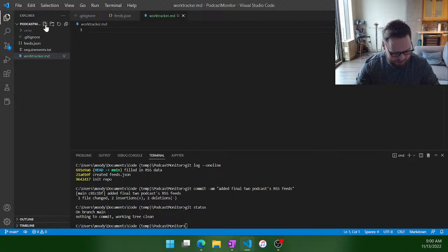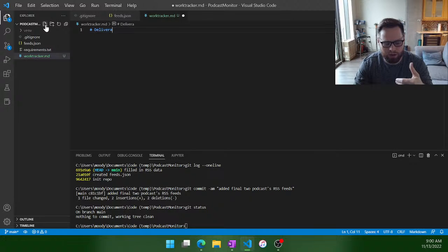And I'm just going to say in here, I personally, with my work, use ADO, Azure DevOps, and they have a concept of scenarios, deliverables, and tasks, where tasks are kind of the low work element. You bundle them up into a deliverable, one simple thing to deliver, and then a bunch of deliverables together create a scenario.